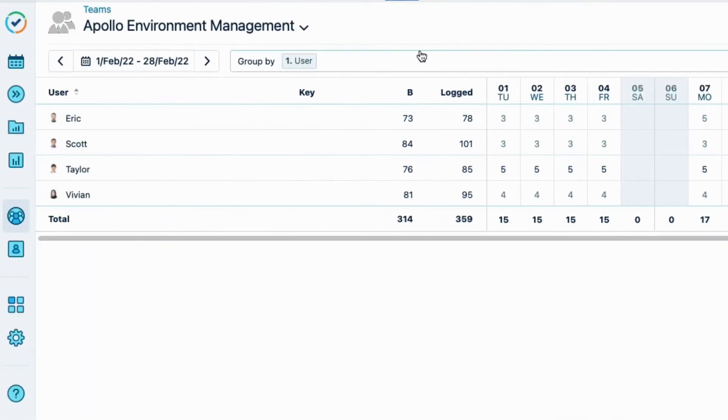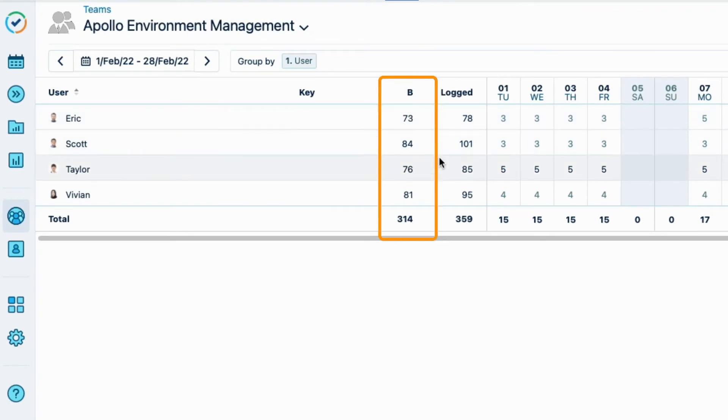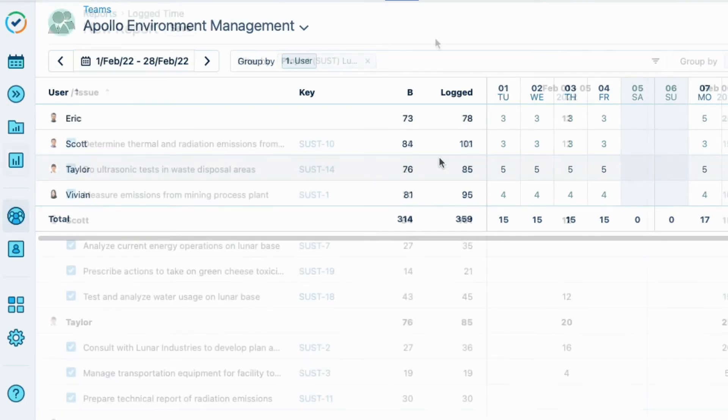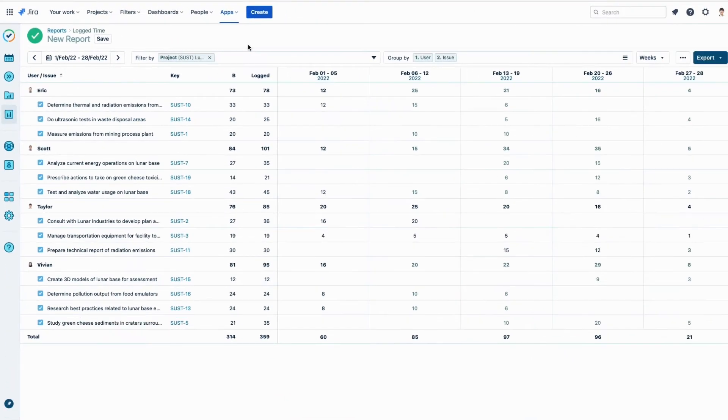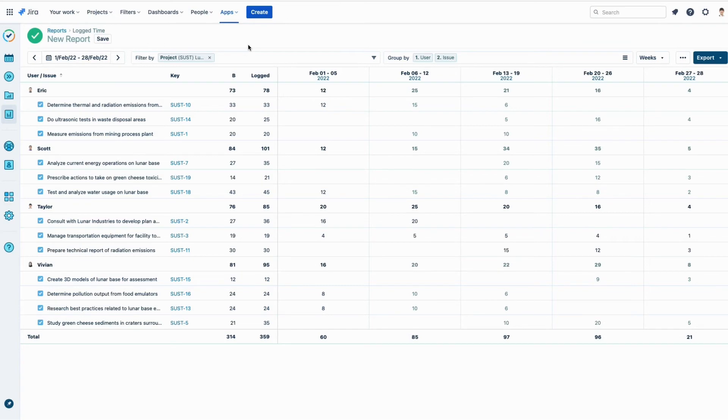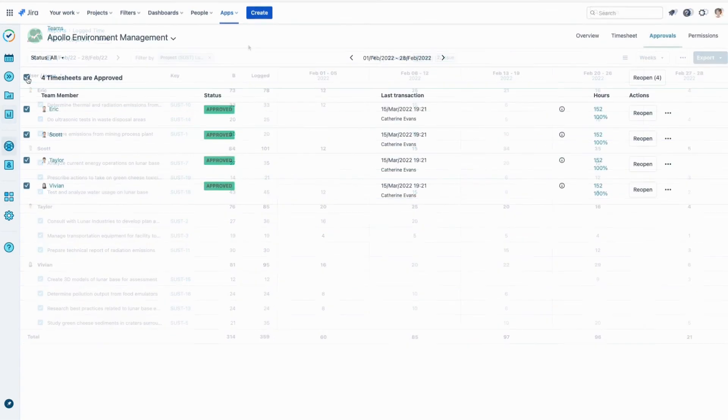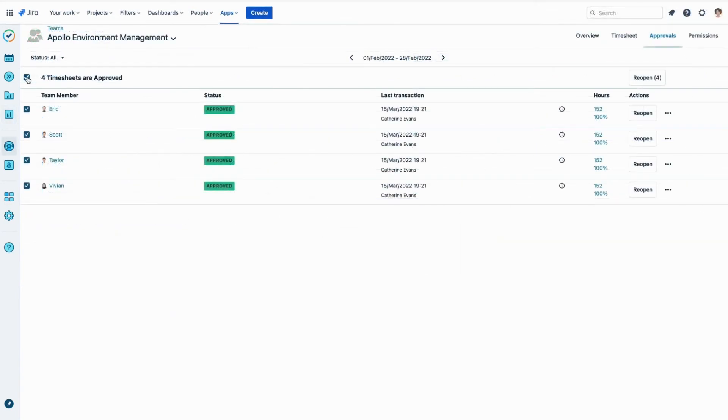And now I see that column. And these are the hours that we logged in the Billable Hours field, like I just did. When this project is over, I generate a report with this information, and more, that I can save and export. And to do that, I need to create a real report. To verify that the hours are accurate in this report, I'll first make sure that the timesheet period is closed, and everyone's timesheet has been approved and locked.